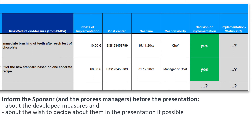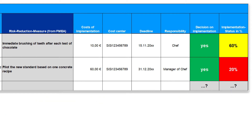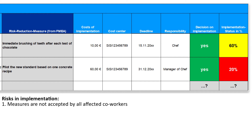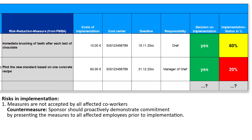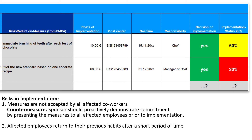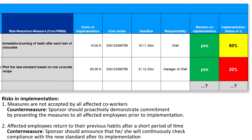Additionally, it is useful to inform the sponsor and the process owners in advance about the suggested measures, so that they are neither surprised by the measures nor by the need to decide on them. In case of positive decisions, please monitor the progress of implementation so that you are not surprised if the implementation is delayed. There are still two general risks during and after implementation. The measures may not be accepted by all affected co-workers. As a rule, the sponsor should therefore proactively demonstrate his or her commitment by presenting the measures to all affected employees prior to implementation. Affected employees may return to their previous habits after a short period of time; to proactively prevent this, please have the sponsor announce that he or she will continuously check compliance with the new standard after its implementation.